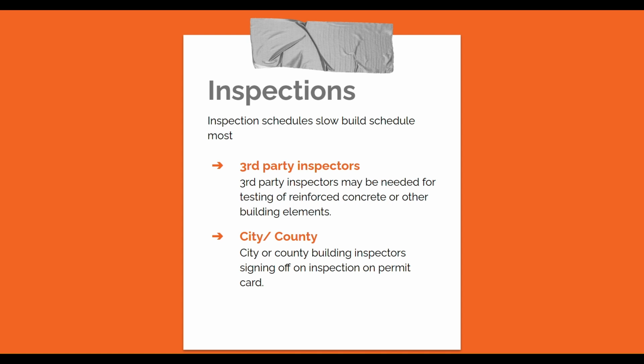So line up your third-party inspector before, get that all passed, and then come to the city and county and have them inspect, and most likely the inspection will go very, very fast since they see that a third-party inspector has already signed off. Then you're going to go through foundation inspection, framing inspection, dry-in inspection, and then insulation, rough electrical, utilities, HVAC, anything running in there, inspection, insulation, inspection, drywall, boom, put that up. Pretty much usually they don't inspect the screws or anything like that. Some cities do, but I haven't had that happen to me since I was like a young kid, dude. I swear to God, I haven't seen anybody inspect sheetrock screws for 20 years, and I'm 29, so it hasn't happened for a long time.